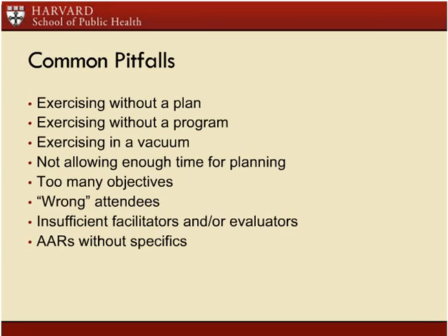After action reports, they're tough. We talked about the purpose of them before, but they often end up watered down because no one likes to have a written report that looks like it's criticizing an agency or naming lots and lots of problems, because we're all afraid it'll make us look bad. And therefore, after-action reports oftentimes lack specifics. They are simply a collection of platitudes about emergency response, that everyone tried their best and really worked hard. And I would encourage you not to write those.